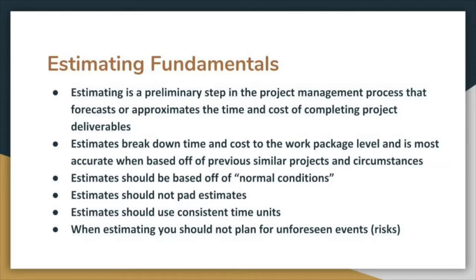It should also be based off of normal conditions, and that just basically means you shouldn't be thinking about contingencies or things going offhand in your project. You need to make sure that when you're making an estimate, it should be based off of what typically happens on an average work day. And then you shouldn't pad estimates, which goes back to the normal conditions.